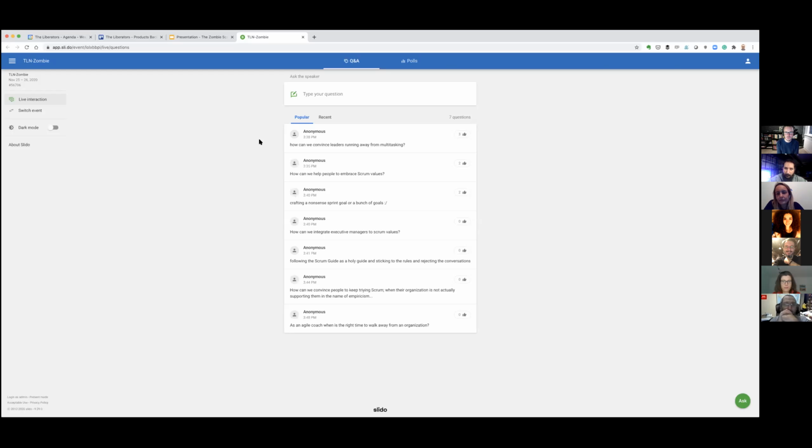Because I do believe that if you multitask too much, it will hurt your organization and your team, not only from, if it's an extreme situation, a health perspective, people that get stressed out, but also it's just a fact that you get less work done. So just see if you can track the lead time, just pick some Kanban metrics and try to measure the cycle time and the lead time and do some experiments. Do a couple of sprints where you focus on not that much multitasking and then track the lead and the cycle time. And maybe do the same when you are multitasking, and I'm confident that you'll see a difference. And if you connect it to money, like, so what are we saving as a company if we don't multitask that much? Then probably they are interested in learning more about it.